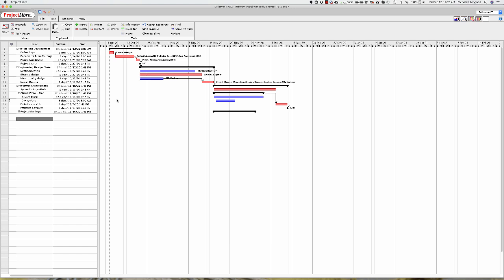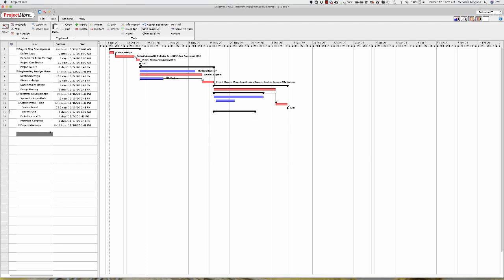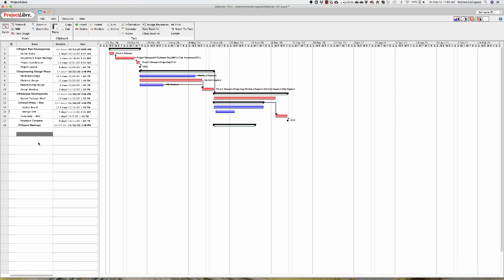to do the job that task requires. Now, we're going to save this as a baseline, and so for the entire project we will save it. I clicked on the little menu item called Save Baseline, and when we click on it, it creates a baseline. So now when we start to do actual tracking of this, we will have an indication of where we are in the project for completed work, but we also can go back and look at it before we started to track it. So how do we track a project?